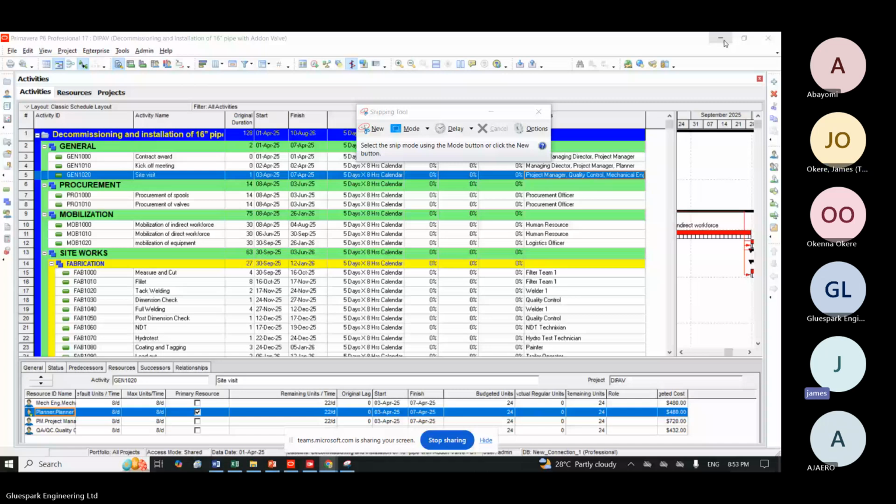Yeah. The WPS level 2 and level 3, the duration assigned to them, can it be changed? You don't assign duration to level 3 and level 4. You only assign duration to activities, and you can change all the duration you have in an activity.